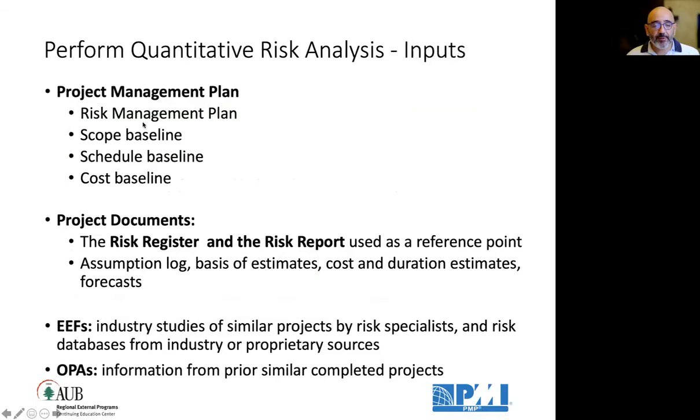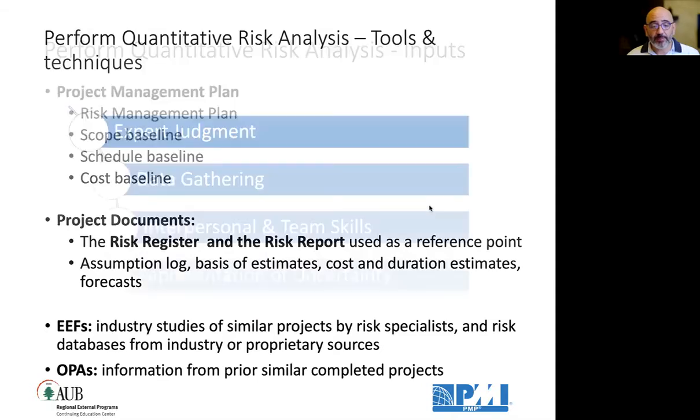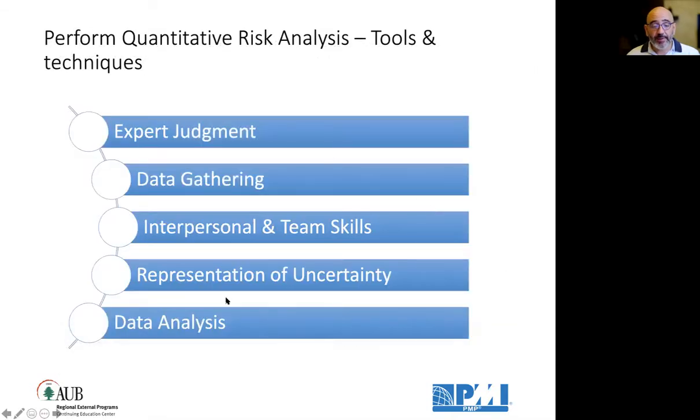I need the risk management plan, scope, schedule, and cost baselines. I need the risk register and the risk reports from previous reports as a reference point, assumption log, the basis of estimate, cost and duration estimates, etc. Industry studies from similar projects by specialists, risk databases, information from prior similar projects. Tools and techniques,